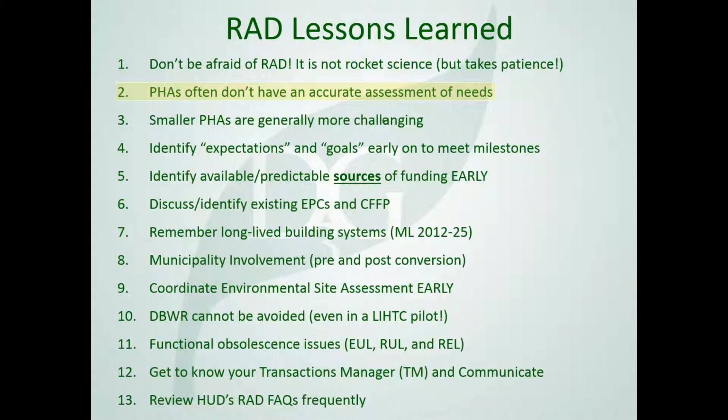In the world of mixed financing, when an equity provider comes in and an investor in a property brings capital to the deal, they want to ensure that it's been recapitalized properly, and one of those is those cabinets will most likely have to be replaced. So there's a disconnect. The housing authority thinks they're in great shape, fully functional, and they are. However, in a transaction to preserve the project and extend these renewing 20-year HAP contracts, certain investors want to make sure those cabinets are replaced. So bridging that disconnect is an important lesson learned in RAD.